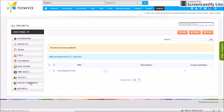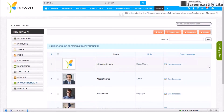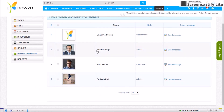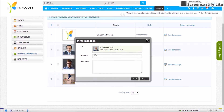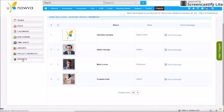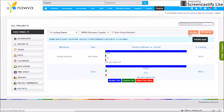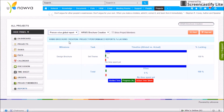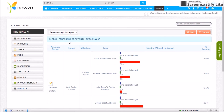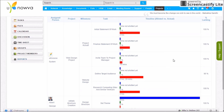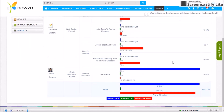The Project Members tab shows all members in your project group with an overview of their role and names, and lets you send them individual messages. The Reports page shows each milestone and task inside it with a graphical representation of allotted time versus percentage progress and actual time taken. You can print this report at any time. You can also select the type of report — such as a percentage lacking report or a person-wise global report showing how much each member has completed.